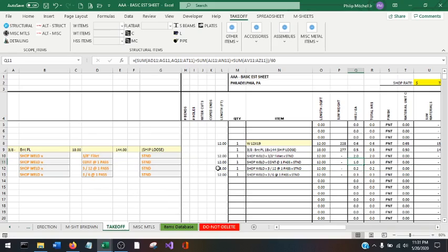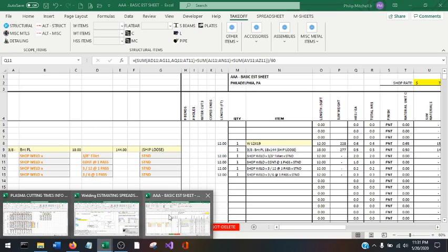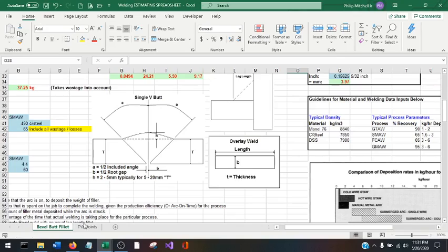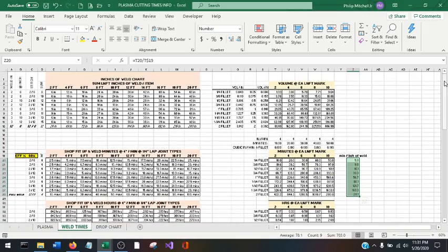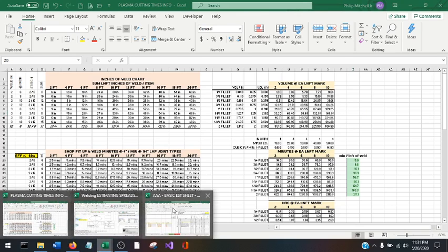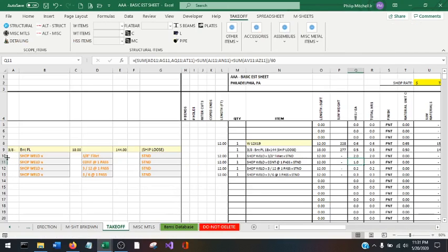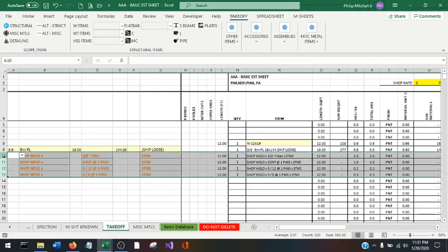And this is just looking at one piece. So obviously in a whole takeoff where you have a 500-ton job and there's various welding required, it will help you compile that information based on some known values and some historical data, and if you're tracking your costs and doing time studies in your shop, you'll know whether these are correct or not. Also, you have the same thing with the field.